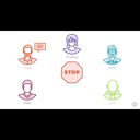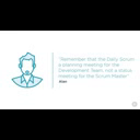Before the next member of the development team speaks, Alan raises his hand. May I offer a suggestion? I notice that many of you are looking to Louise while contributing to the daily scrum. Remember that this is a planning meeting for the development team, not a status meeting for the Scrum Master. Try to shift your focus from reporting your status to Louise to instead discussing the items that are currently in the sprint backlog. Directing your attention to the Scrum board while you're speaking will help you do this. That's great advice, Alan. Thank you for reminding us, answers Louise. Okay, Josh, it's your turn.